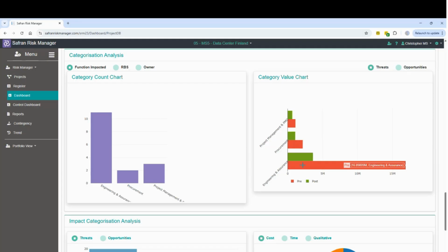And invariably what they would say is, well, we've got 10 suppliers of material, but all I've done is put a single risk in my risk register that says material suppliers. And the ideal scenario for that would be, let's have one risk per supplier and ensure that our actions are specifically tailored to ensuring that those suppliers are going to be meeting our requirements. So that could be a very simple way of utilizing this report.